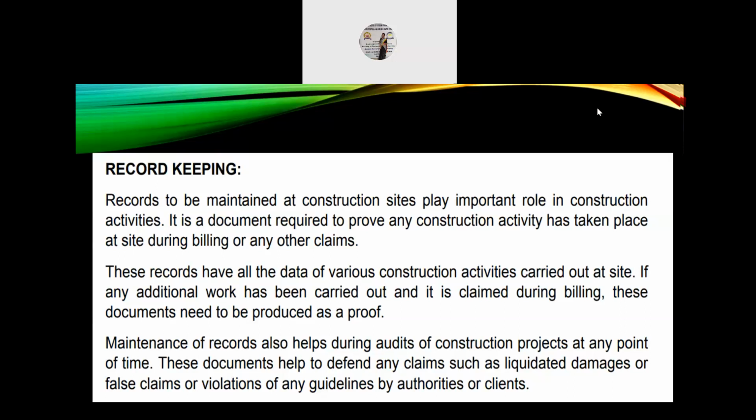So if any additional work has been carried out and it is claimed during billing, these documents can be produced, or need to be produced, as proof of the payment or proof of billing. So maintenance of records also helps during audits of construction projects at any point of time. This document helps to defend any claims such as liquidated damages or false claims or violations of any guidelines by the authorities or clients.